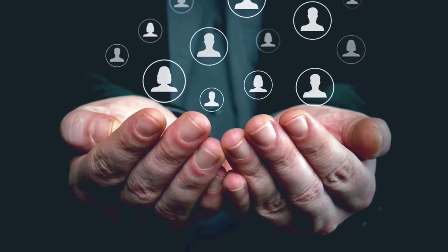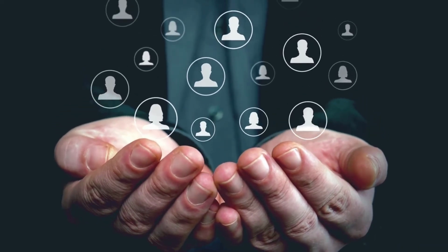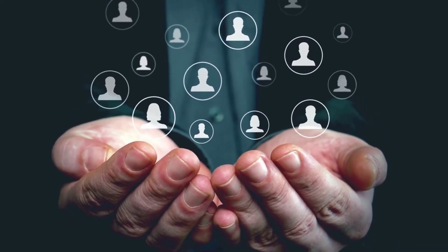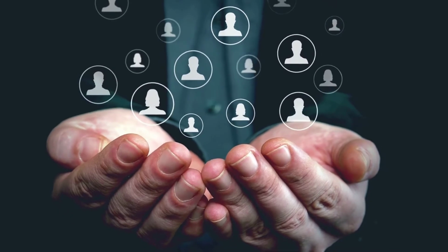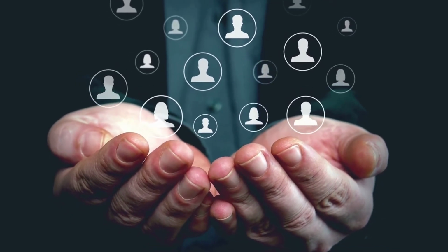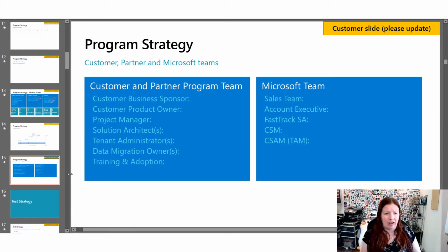For example, lack of a customer project manager can lead to the inability to get the proper resources or to marshal those resources to get tasks completed on time due to competing priorities of their daily work. While lack of a partner project manager can lead to lack of direction for the partner resources, misunderstandings, unwarranted gaps in the solutions, and a risk of ambiguity of the overall solution.